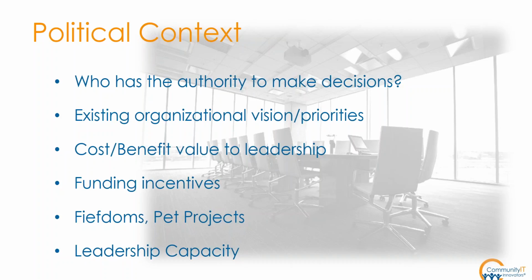Now, moving your files from an on-premise file server to SharePoint, let's say, that may require a significant learning effort by everyone in the organization and a significant cheerleading effort by the senior leadership. You don't want to do that when they're in the middle of trying to secure a bunch of funding from high-profile donors, or when they're about to launch a new initiative overseas. What's the capacity of the leadership to support the technology project, depending on the level of the project?